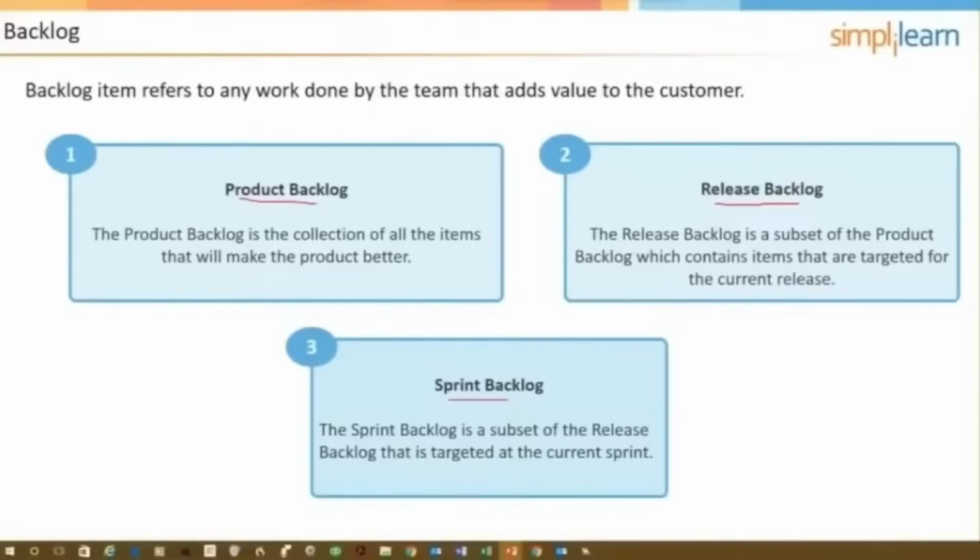For example, I've got a real-life project that I'm working on, and my product roadmap has 3 versions. It's a website. The first version is free. The second version includes a membership component, and the third version includes a referral commission portion to it. And so I will then do 3 releases. I'll have all the user stories that will result in version 1, all the user stories that result in version 2. So that's what the release